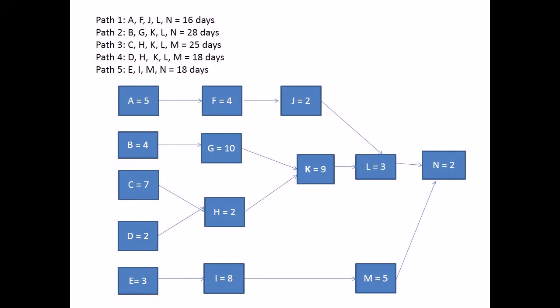In this network diagram there are five paths. Each path is identified by the arrows connecting the boxes. Each box is an activity. Each arrow is the relationship between the activities. Note the relationship between activity H and activities C and D. Activity H is dependent on both C and D. In other words, both activity C and activity D must be finished before activity H can start.